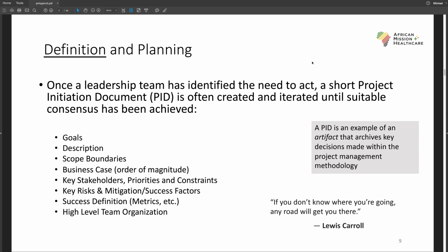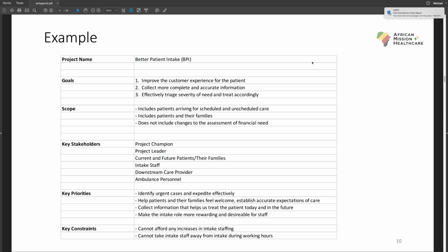I used the term artifact up front, and just to make sure that's clear to everybody, it's meant to be sort of an archaeological document or deliverable from a project plan that is visible to all parties, that all parties can provide feedback into, and it provides what we call traceability. But 3 years into a project, it's always good to go back and read the project initiation document and, quite frankly, change it as necessary, but remind ourselves what we were at first trying to accomplish. Even on shorter projects, that's a very important role.